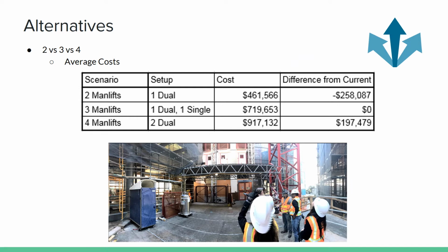Through multiple discussions with Webcor, we've established some average costs that go into renting and maintaining the man lifts. Some examples of these costs include installment, floor jumping, testing, and other rental costs. Here we can see the cost variance between the three scenarios, in which 3 man lifts is their current setup.